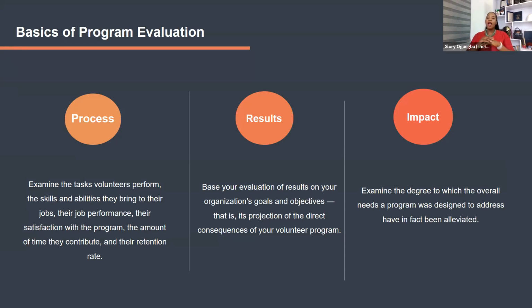That's the impact, because 500 orphans are able to go to school because their mothers are earning small money. 500 orphans have moved from poverty, they can find food to eat, and they are able to go to school. Do you see how my impact now relates to education? I've been able to tie what I did for some poor beggars to education. So I said I've reduced the number of out-of-school children from 2,000 to 1,500. That represents about 25%. I've taken 25% off from the streets into schools.